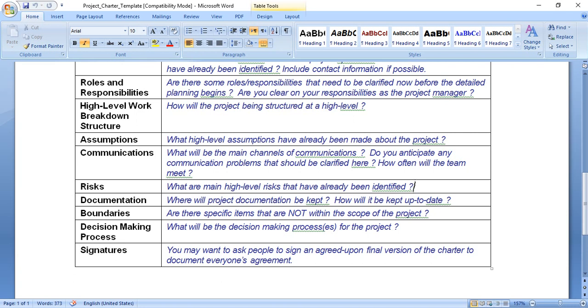Number three, vendor assisted or fixed price. For a tightly defined project, a fixed price contract can be negotiated, where the organization will pay one price for all services delivered. Services could include software cost as well as the manpower cost needed for implementation.